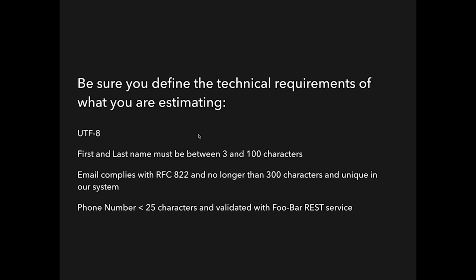So now our original estimate of, oh, I can do a contact form really easy in 5 minutes, which is normally the first thing you learn after a hello world. Now I have to talk to a third-party service in order to validate this phone number. And now our original idea of what was entailed inside of this requirement has now grown. So it's very important to be clear and concise in requirements.